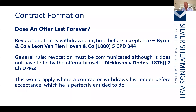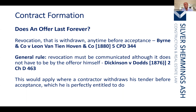How long does an offer last? If you state in a tender that it is open for three weeks, then it is open for three weeks. If you haven't stated a duration, it is open for a reasonable period of time. What is reasonable depends on the facts — on a big project it may be reasonable for your tender to be open for six months; on most projects probably not five years. It will depend on the nature of the work, the organisations involved, and other circumstances.